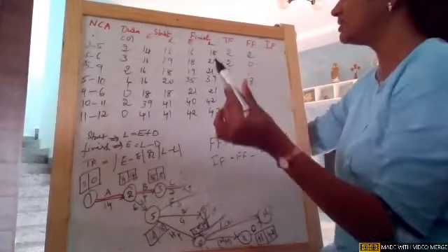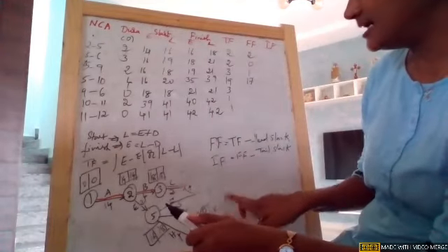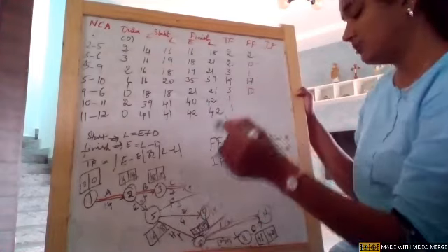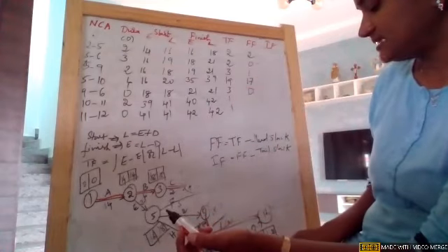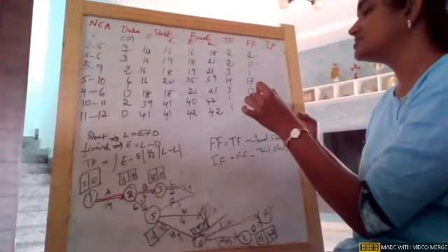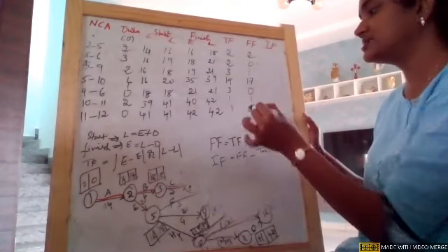One more thing. On node 9, the slack is, 18 and 21, it is 3. So 3 minus 3 is 0. On node 10, the slack is 0. 1 minus 0, it is 1. And on 11, the slack is 1. So 1 minus 1, it is 0.